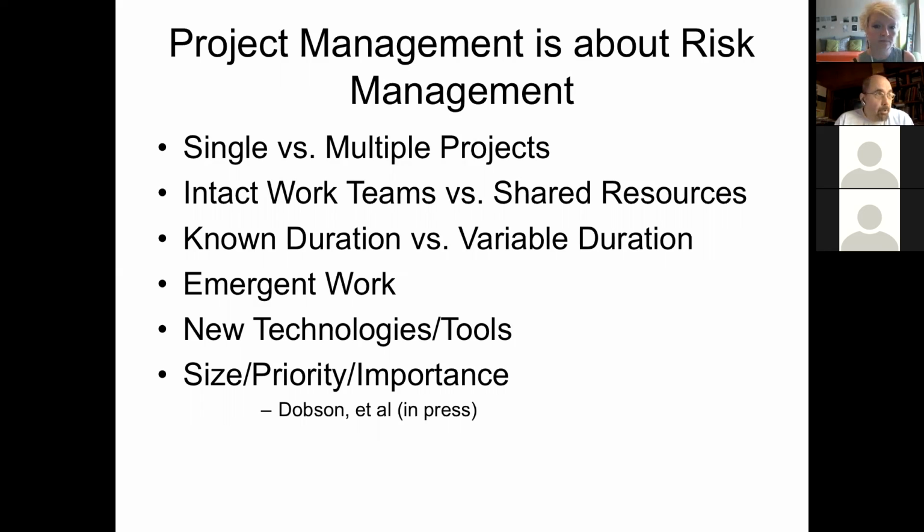If it's emergent work, in other words, not very much is defined about the project, that drives risk up. If there are new technologies or tools involved, and if the project size or priority or importance is different from what you're used to and your team is used to, then that's a problem. That's a source of risk.